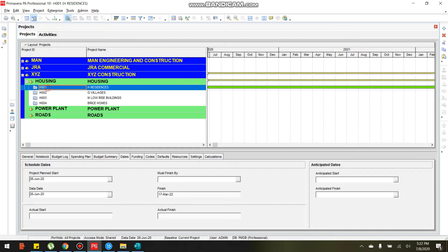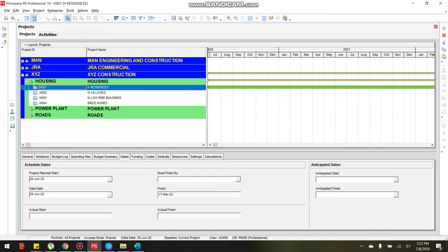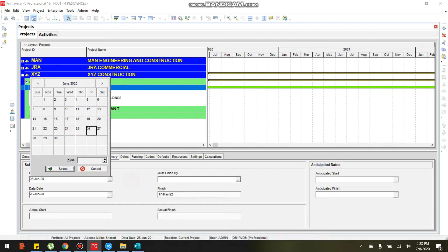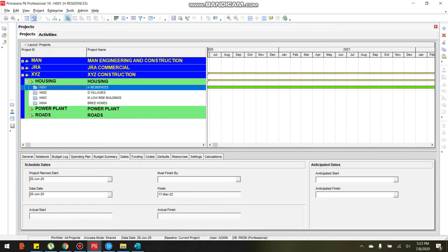But before we update this project, click first to copy this full project, then we will assign the copy of this project as a baseline. And prior to that, we need to adjust the project plan date in the project details below.